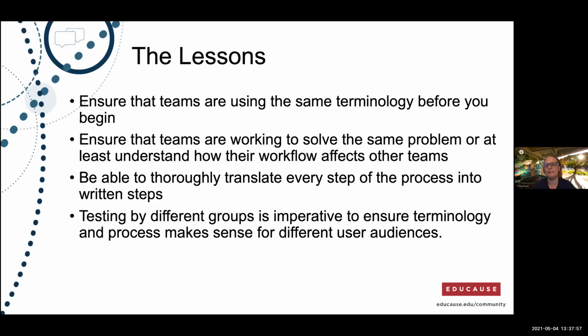Also, testing by different groups is imperative. We had people in our help desk test it just to make sure that it made sense. We didn't actually have any end users test it, which might be something in the future that would have been very useful. Just for the sake of time, we stuck to different groups in the department, and they were able to tell us, like, this doesn't make sense, or the terminology is a little off. So that was really helpful for us.